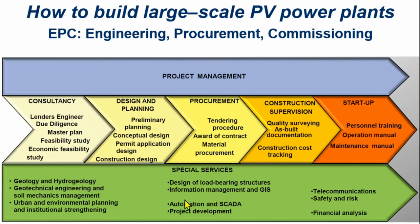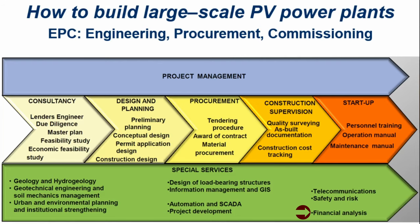There are also some special services related to it. First, you have to check whether the ground is stable — research on geology, hydrogeology, geotechnical engineering, and soil mechanics management. You may also need expertise in urban and environmental planning. Then the load-bearing structures — you have to show they will survive, usually taking a 100-year storm. Then information management, GIS, automation via SCADA, project development, telecommunication, safety and risks, and a financial analysis.